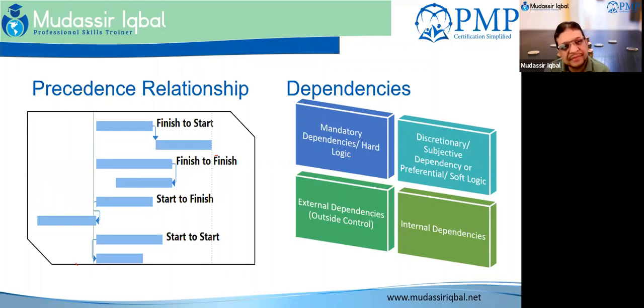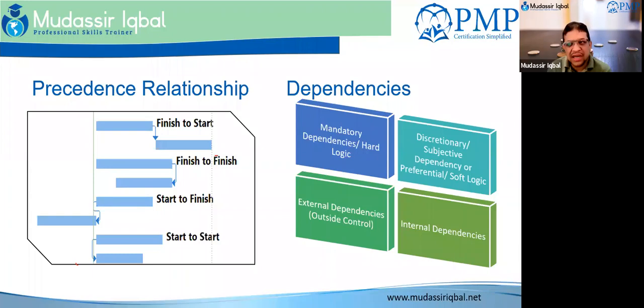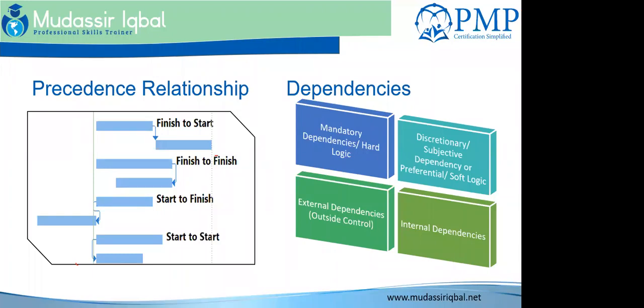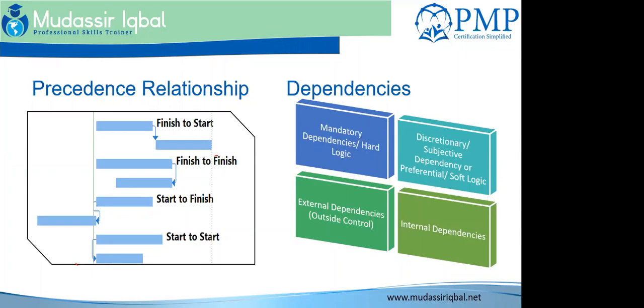Well, you don't have to wait to install your toilet for your carpet to be laid down. So if you're tasking, just really generic, your plumbing fixtures are going to be installed. They don't have to necessarily wait for the carpet in the next room to be installed. I would not create any relationship between that plumbing and the carpeting. They are completely two different tasks. It has no dependency.